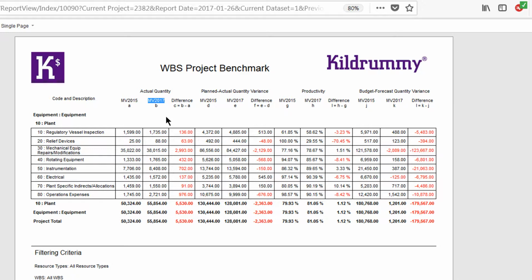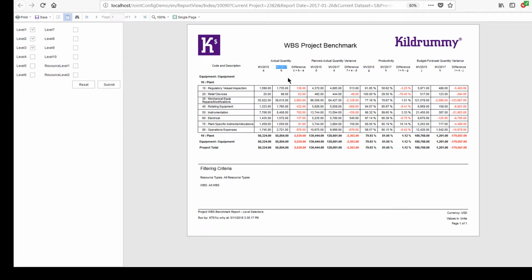You may wish to go to a more finite level of detail on a certain project than others, but you should still look to maintain a common level or multiple common levels. Potentially it could be area, it could be type, it could be asset type, it could be commitment type, etc. Those are completely configurable by your own choices, but if we can try to create at least one or two levels of consistency in that structuring, it immediately allows me to do what we're looking at on screen.